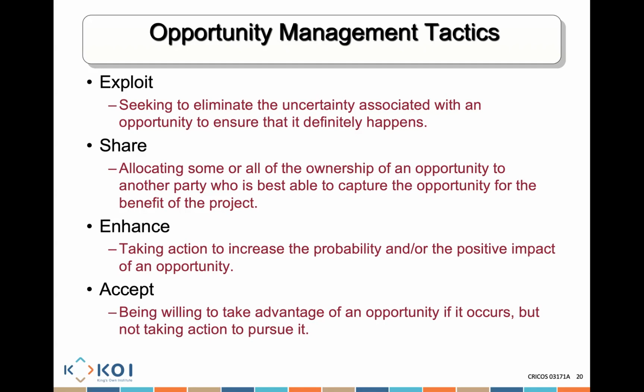I could share that opportunity. I can allocate some or all of the ownership of an opportunity to another party who is best able to capture the opportunity for the benefit of the project. For example, to get the job done, I need more people who work in a drilling field, and I can go to that company and say, I'm going to give you that particular risk to work with me. I want your employees to help me get that particular task completed.